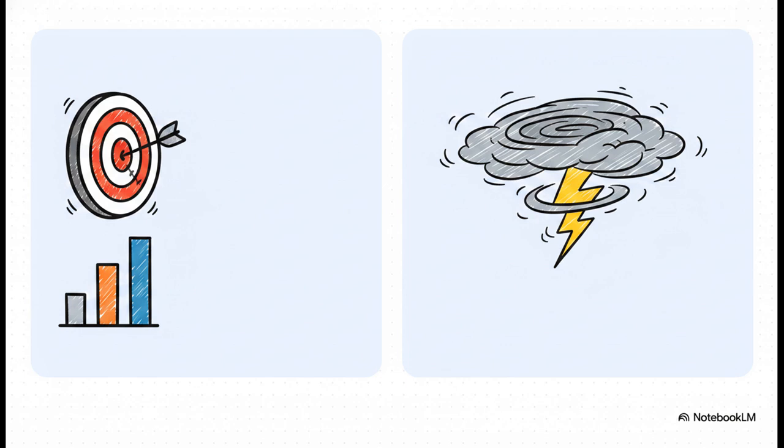Risk is measurable, and it's controllable. We can actually assign a probability to it. We know the chances of the outcome. Uncertainty, on the other hand, well, that's completely unknown and unmeasurable. Think of a sudden, unprecedented tectonic shift that destroys an unbuilt site foundation. We just can't assign a probability to that. The takeaway here? We can manage risks. We just have to survive uncertainty.